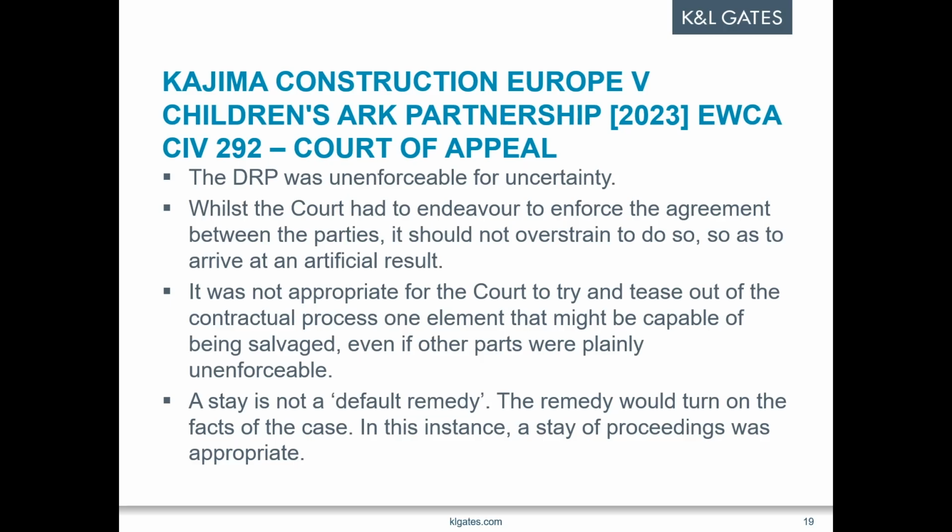The court should not isolate the provision requiring referral to the liaison committee and ignore the other parts of that process that were unclear. It was not appropriate for the court to be teasing out the contractual process one element that might be capable of being salvaged, even though other parts were plainly unenforceable. So basically saying you can't pick and choose. He did go on to say, though, that a stay is not an automatic or inevitable remedy when a party neglects the contractual dispute resolution procedure, and the appropriate remedy will always turn on the facts of the case.